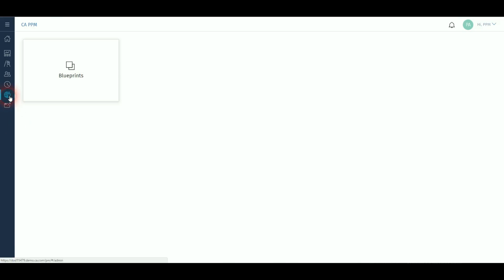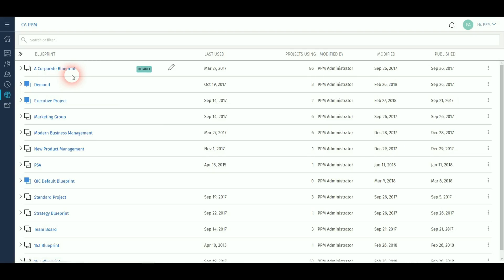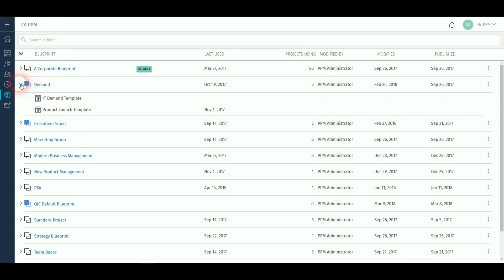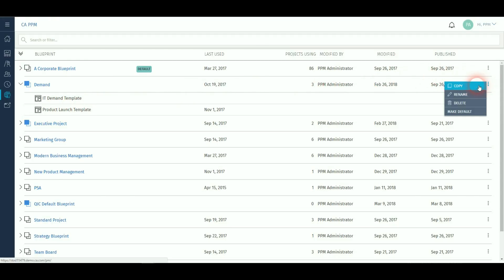Blueprints allow you to be able to change the way projects look in terms of the tile visuals modules displayed and attributes available to be completed. There can be several blueprints and if a project template is associated with this blueprint then when a project is created from that template it inherits these characteristics. Blueprints can be copied to act as a basis for a new one and templates reassigned to these for resulting new projects.